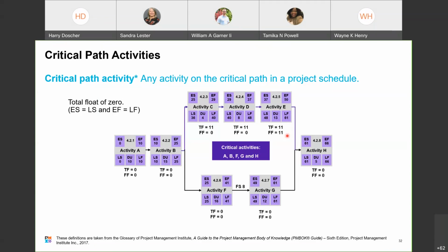So let me try to help provide a little bit of insight in here, maybe just a different voice. So when you take a look at your critical path, you have these two activities, C, D, E, and you have F and G, which are happening together, right? And the reason why we see that gap between early start and late start in that top activity is because while these activities are completing together, there's one that takes longer just because the durations are longer, 16 and 12.